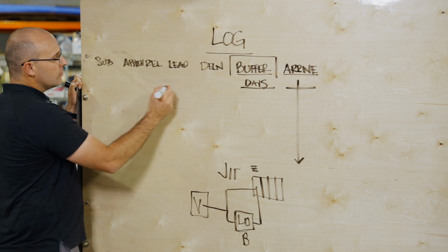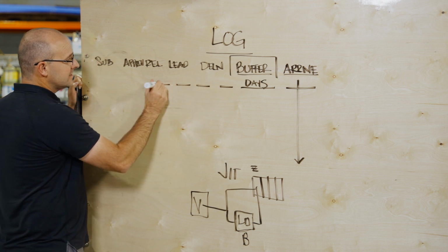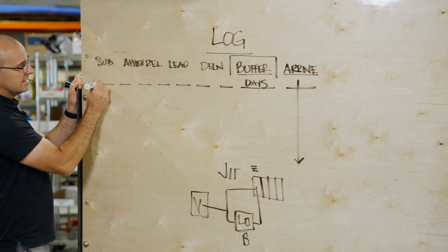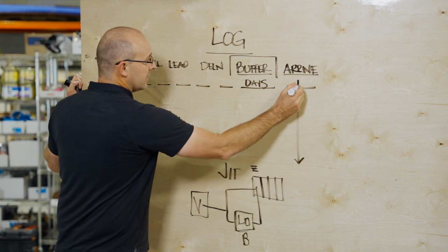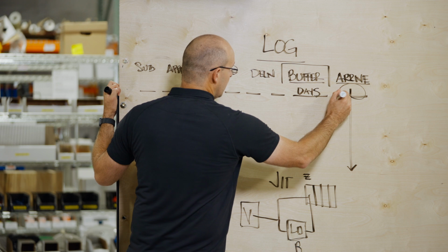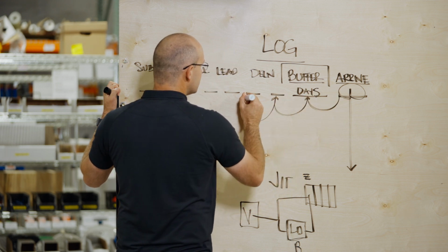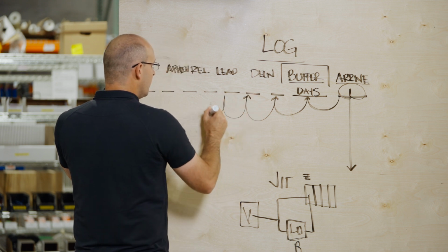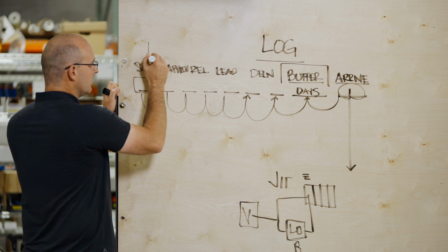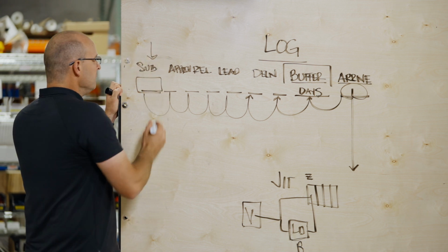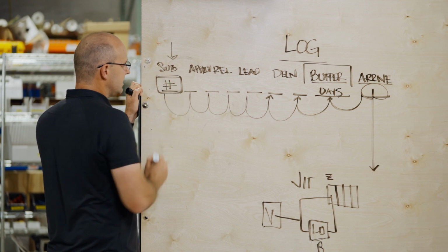Now, we've always seen that each one of these has key dates and durations by contract that it takes. So this log should auto-populate from the arrival date minus these days, minus the days of the delivery, minus the days of the lead time, all the way back. It should give you a date, if this is in fact the stage that you're at, when that trade partner needs to create those submittals. What is the actual date there?